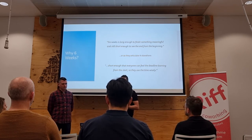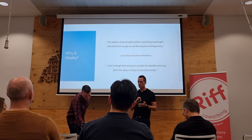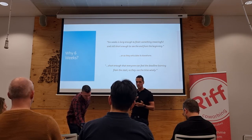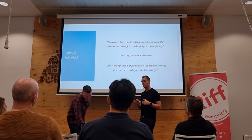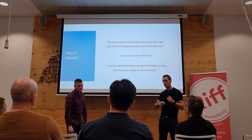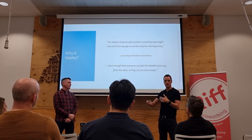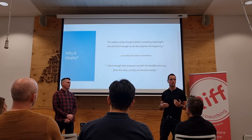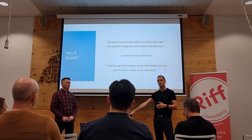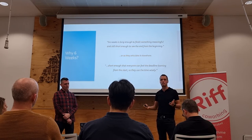So what do we do instead? We still have some of the ceremonies that may be familiar. We still have planning sessions. We still have retros, so we do bookend our 6 week cycles. But the other things we do in the middle of the cycle. Every 2 weeks is a grandstand, so we get to show stakeholders what we're doing. We have on-demand tech reviews, so we don't do a tech review at the very end, we don't do a tech review just at the start, we do them maybe every 3 days, if that's what that project demands.